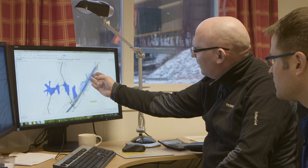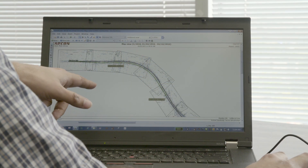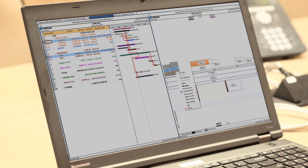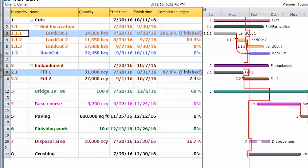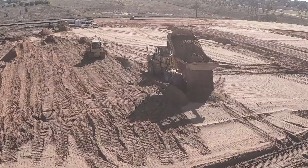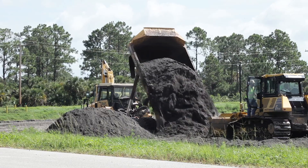Dynarode makes evaluating the impact of design changes fast and easy. Whether exploring iterative solutions during the planning phase or inputting actual progress during production, changes entered into Dynarode automatically update data throughout the project plan. Whether we have a dump site in the middle of the job or run two dump sites at either end, we can run through scenarios very quickly with basically a flip of the switch in the program.